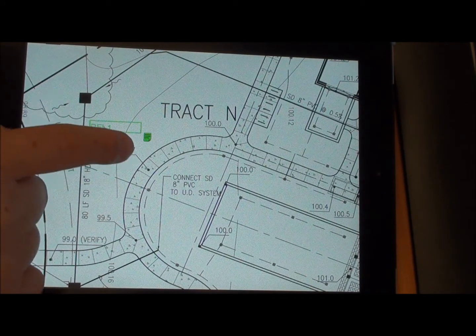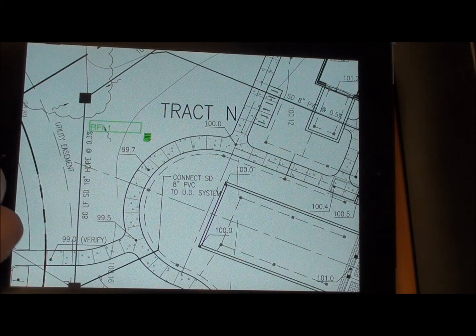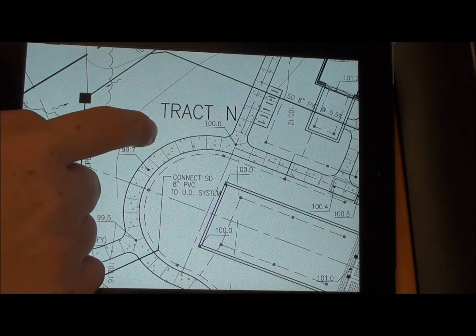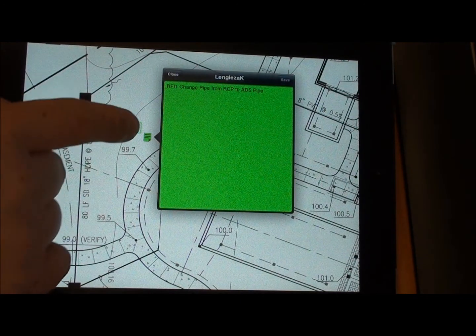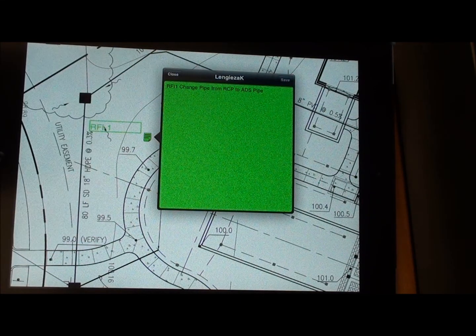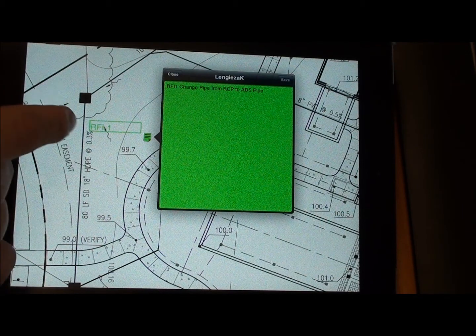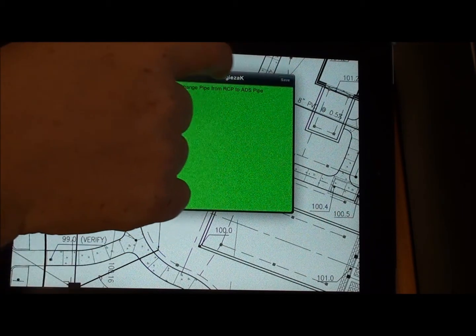There are a couple ways to look at it and see what that is. We can click on it and it'll tell us what it is — RFI-1: changed pipe from RCP to ADS pipe in that section.